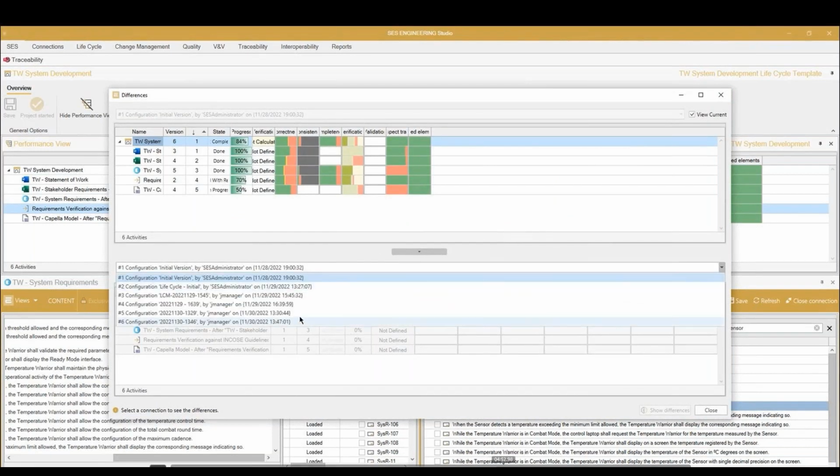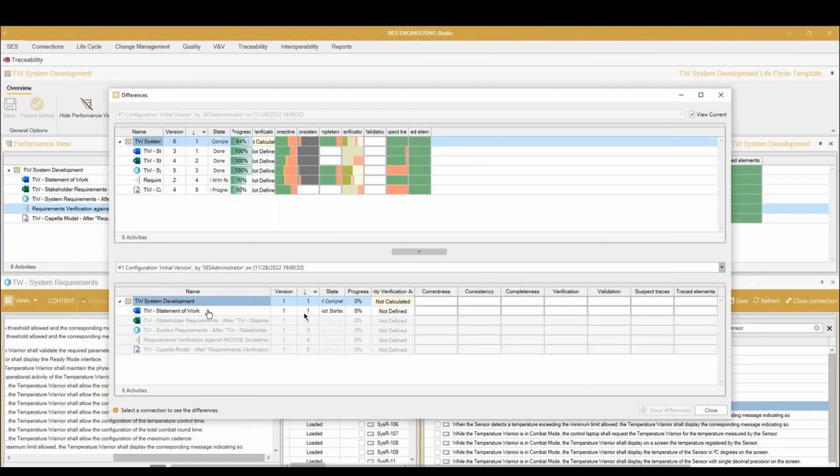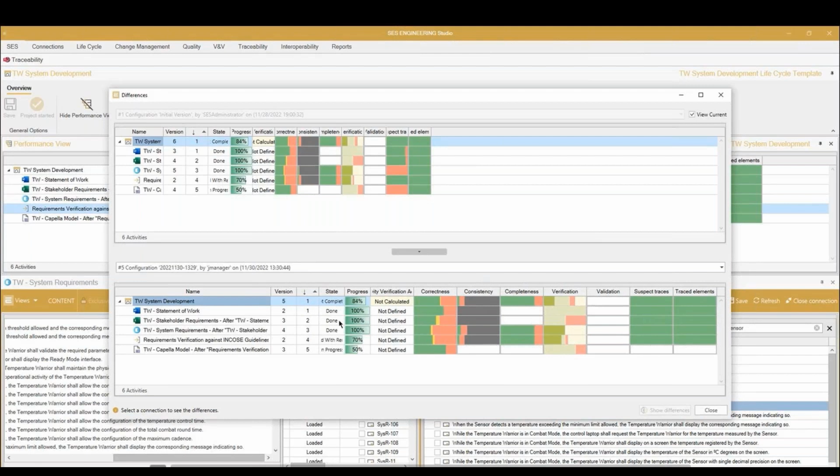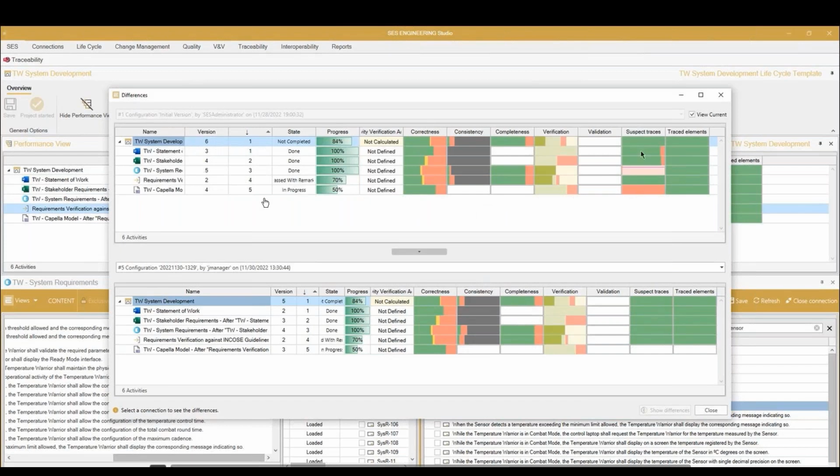And here, if we look at the last baseline that has been generated, we see that we organized the columns as well. Just take a look at the versions. That's very important. So I will use the pointer here. The document endorsed was version 4. It moved to version 5 because of the version of the object, which was version 3 and moved to version 4. So object versions are different from the baseline version.